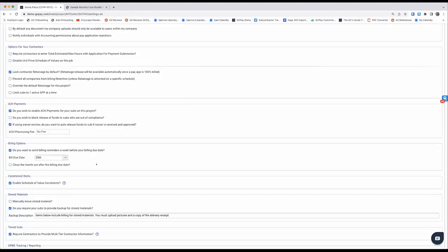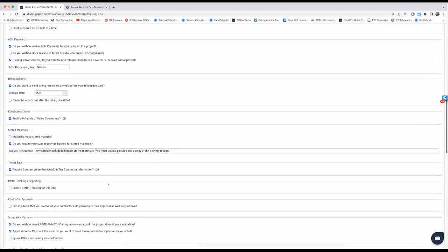Now, I'm sure your subs are never late submitting their billings. However, for the few that are, you do also have the ability to close the month out after the bill due date. So for example, if a sub tried to submit their billing to you on the 30th, it would tell them it's automatically being pushed to the following billing period. We've heard really good feedback because apparently it only takes one time to happen to a sub and they're never late billing again.